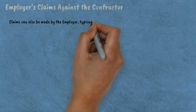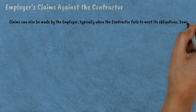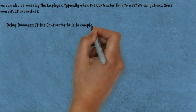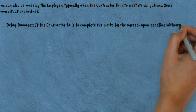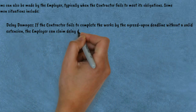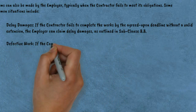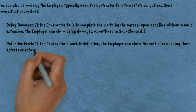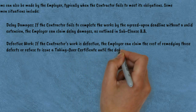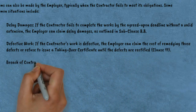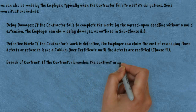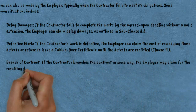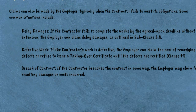Fourth, employer's claims against the contractor. Claims can also be made by the employer, typically when the contractor fails to meet its obligations. Common situations include: delay damages — if the contractor fails to complete the works by the agreed-upon deadline without a valid extension, the employer can claim delay damages as outlined in Sub-clause 8.8; defective work — if the contractor's work is defective, the employer can claim the cost of remedying those defects or refuse to issue a taking-over certificate until the defects are rectified (Clause 11); and breach of contract — if the contractor breaches the contract, the employer may claim for the resulting damages or costs incurred.